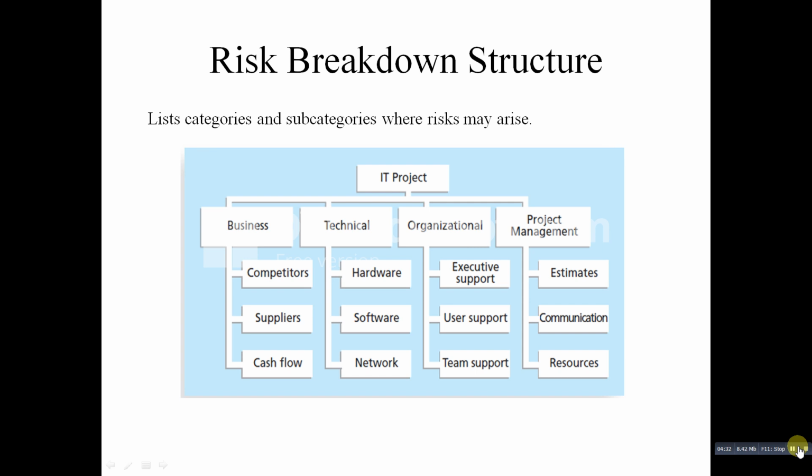For the time knowledge area, risk conditions may be errors in estimating time or resource availability, errors in determining the critical path, poor allocation and management of float, early release of competitive products. For the cost knowledge area, risk conditions are estimating errors, inadequate productivity, cost change or contingency. Then for the quality knowledge area, risk conditions may be poor attitude toward quality, substandard design, materials and workmanship.